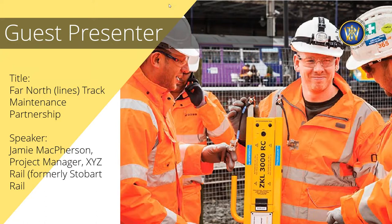Yeah, sure. A question from Peter Halliwell. Hi, Peter. How much of the new rail was used in the works, and was any left for ongoing maintenance in the areas not renewed? So what we've done, I think it was something like 3% extra rail per site. We got the client to provide us off cuts, so we can go centre bed for cuttings, stuff like that. But at the end of the job, there were only 9 rails left at the end of the works. 9 full rails, that was only 0.25% of the whole job. And that was new rail, I presume.